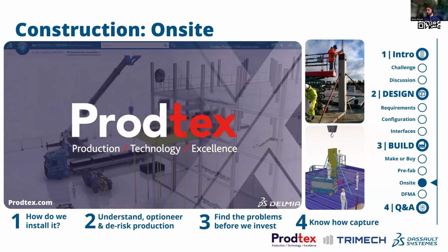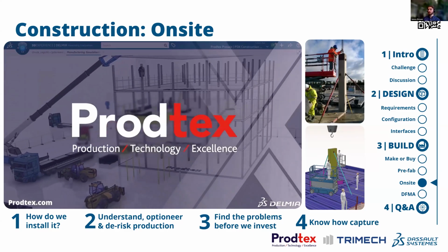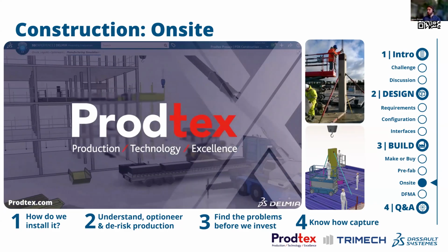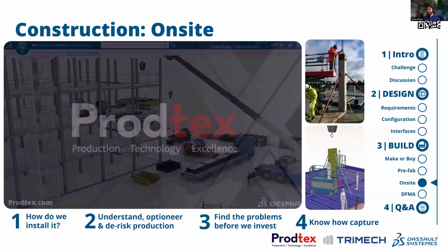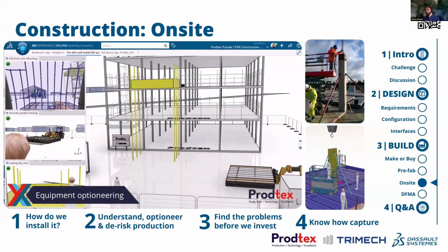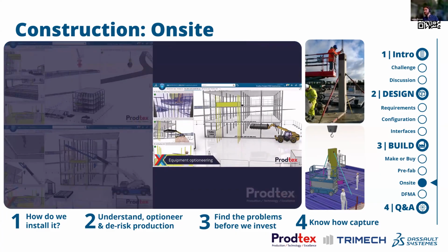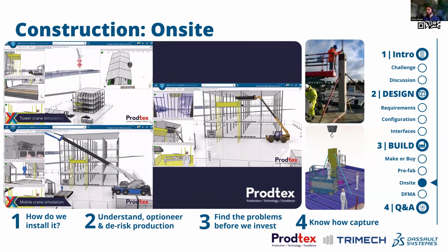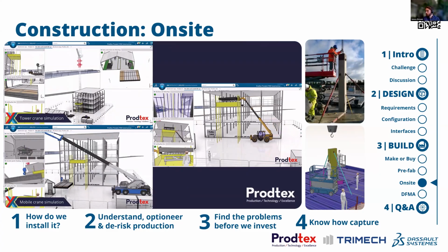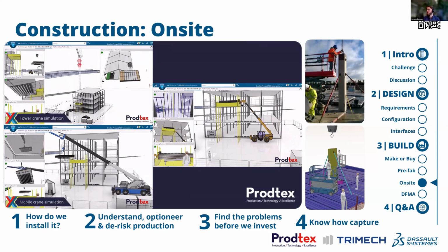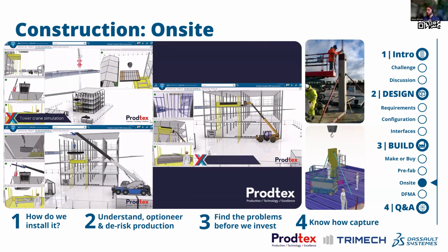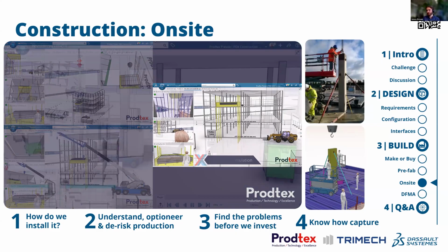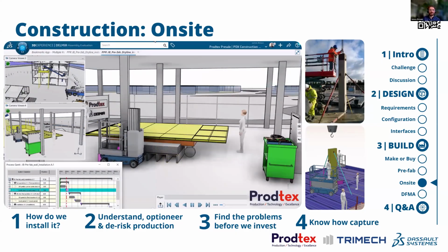We simulate it once. We understand the processes related to it. We understand the optioneering related to it. And then when we look at our entire site deployment, we can start to see actually for 90% of the site that standard method works. And this last little 10% is really tight. That part looks okay. We've checked it and it looks good. This part is a big problem. We need to rethink our process, buy some new equipment, and you solve this before the fire happens on site. So it's trying to eliminate or predict firefighting effectively, which I'm sure never happens on the sites of the people here.